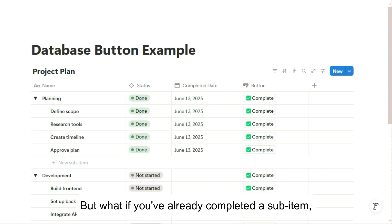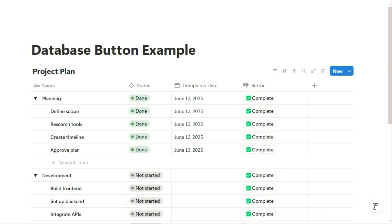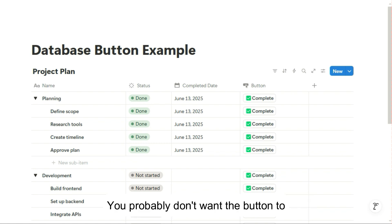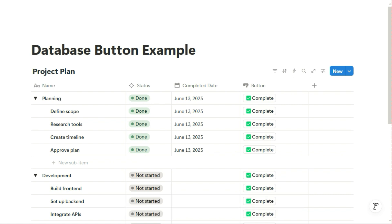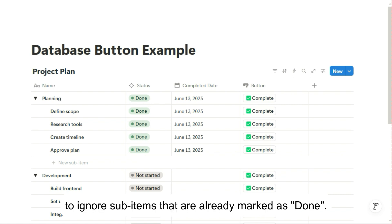But what if you've already completed a sub-item? You probably don't want the button to change its status or completed date again. So let's update the button to ignore sub-items that are already marked as Done.